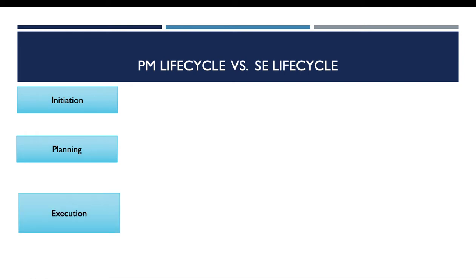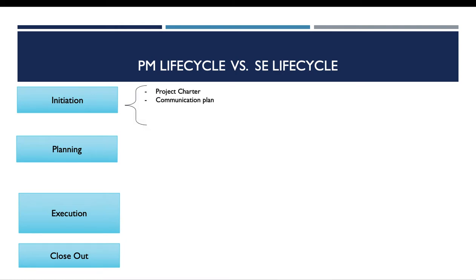For the initiation phase, the main deliverables are the project charter, the communication plan, and an initial project plan. For the planning phase, we deliver mainly the project scope plan, schedule, and budget.